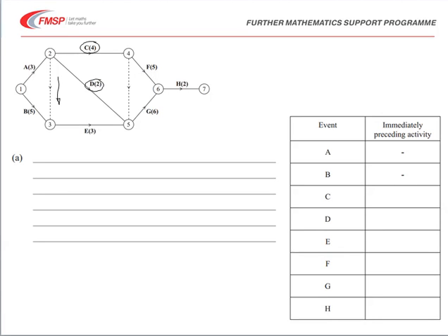So we should say in our solution that activities C and D depend on A only, but that E depends on A and B. Hence that dotted line. It's called a dummy line going in here. There's also another one you can see from 4 to 5 which has a similar purpose.